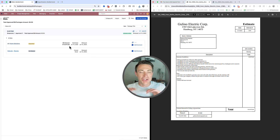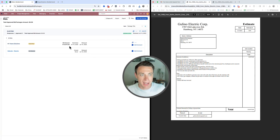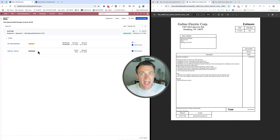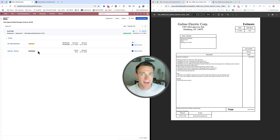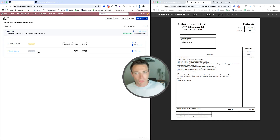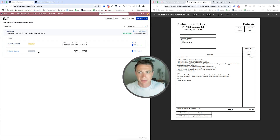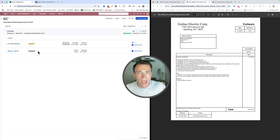This should be a big part of your pre-construction process. Establish your bid packages, establish the subs from whom you're requesting bids, and then track them to completion. Even if you use the same person every time, you don't need this to be a gigantic competition, but we should get into the habit of trying to get an estimate from everybody. Sometimes it's like — you won't get a formal estimate. Just have the conversation: 'We got a project coming up, it's very similar to X, Y, and Z that you did before — do you think it's more or less?' Submit your own estimated bid. It doesn't have to be a big official thing.